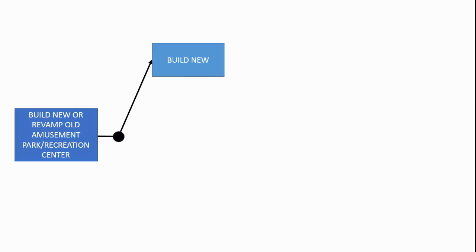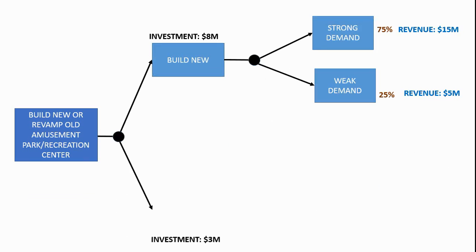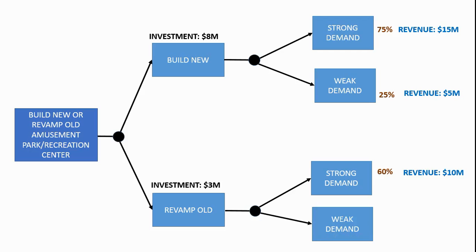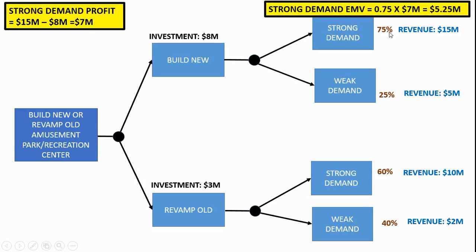So we've got our chance nodes. Build a new center — it could be strong demand or it could be weak demand. Next we draw out the revamp option and then start the math. Strong demand: find the profit — that's $7 million, which is $15 million minus $8 million. After getting the profit, we multiply the probability by the profit — think of it as probability times impact. You do that, you get 5.25. And that is the EMV for the strong demand.